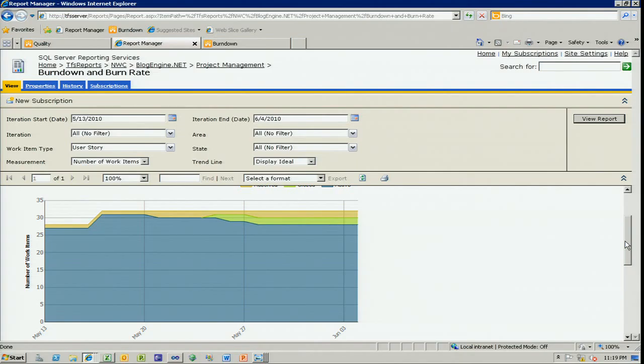What does that imply to you project managers? I'm closing down my tasks, but my user stories are not yet closed. Working on the wrong stuff. What's that? Not tested yet. Ooh, I like that one. That might be a legit reason if you're alternating tests between iteration. I like having it in the same, but it could very well be. What's another dangerous thing that this exposes? What was that?